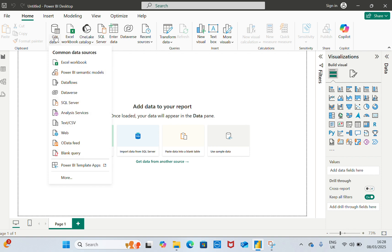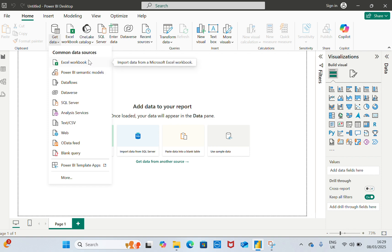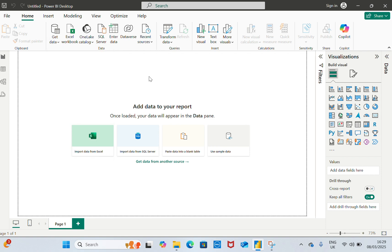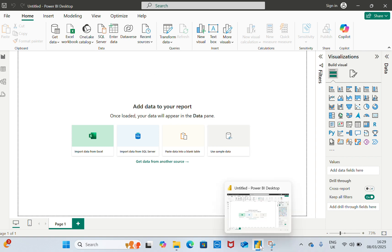we should link Power BI to the Microsoft or Oracle database. For this we need a bridge between them. For the bridge purpose, we are going to use Open Database Connectivity between them. We can do this by extracting the Excel sheet also, but it will be a manual process and difficult for us to get the real-time data from Power BI from Primavera P6.